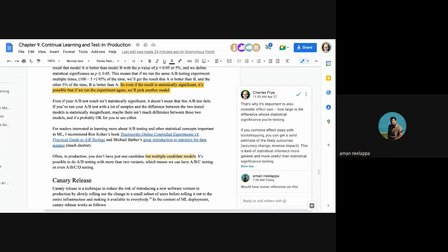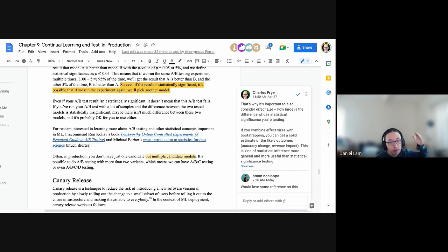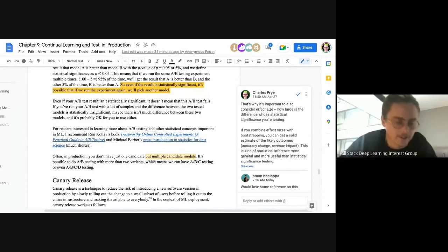Right. And then there's a risk register. If it's a big program, they have a risk register and they list it down as a risk and allocate some funds to it. They say, okay, there's this risk and we're going to put X amount of money toward addressing it if it comes up later. And they put a mitigation plan into the overall plan. That's a great point, Daniel.